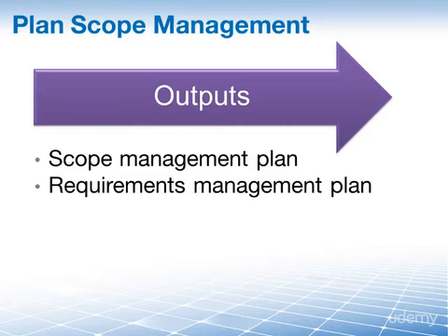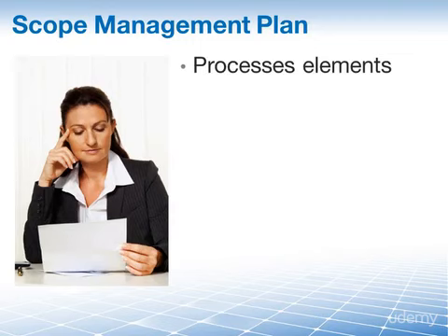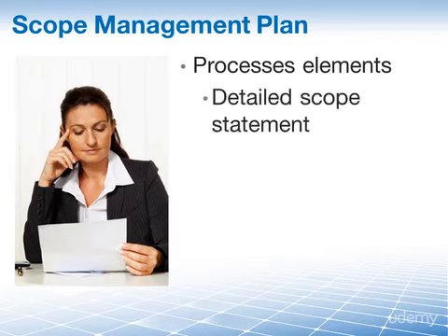Well, let's look closer at both of these outputs. The scope management plan contains key elements that make it useful as a major input when we develop the project management plan. These elements help the project team in managing scope in several areas. First of all, it helps prepare a detailed project scope statement out of the scope that was identified in the statement of work and project charter.